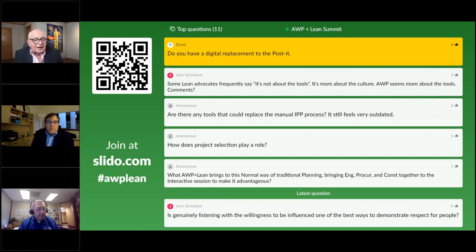And in the system that Fernando's talking about at Stanford, one person kept the system running and made all the updates, and then plotted out for each of the crews what their plan was for this week. They would update it, and the next day it would be plotted out again. So it was touchy feely in the field, actual live with your hands, but electronic at the same time, because it made sense to that team at that time. It was very real. Yeah, absolutely. And that's vPlanner. Great system.